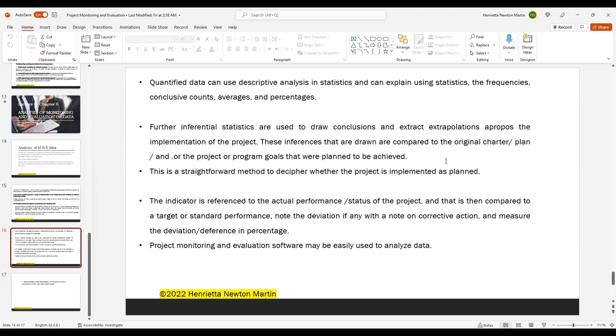You would evaluate the actual performance vis-a-vis the standard or target performance and see if everything is matched 100 on 100. Wow, it's good. So you would say no deviation, or deviation zero. Are you understanding me? But in case there is a deviation, you would put it possibly in a percentage form, say a 2% deviation or 10% deviation, 25%. Oh, 25% is a percentage that we need to be concerned about. 25%, 50% deviation, that's again a percentage that you need to be concerned about.